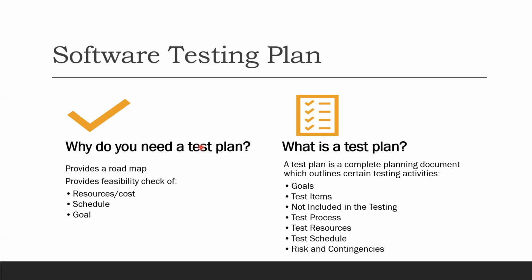Your code should be at least a week ahead in your end-to-end environment. But alas, if that is the case, regardless, you then have the developers running late on code because, say, a defect was found late in and now it needs another change. So that poses problems also on your team's deliverables. So that is another risk, right? So you start raising risks for your end-to-end at every level.